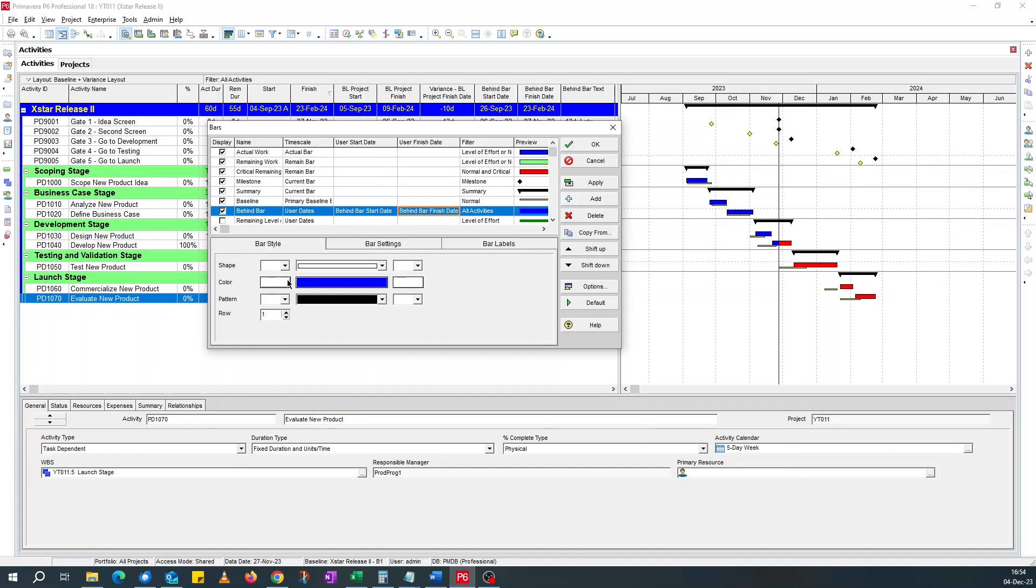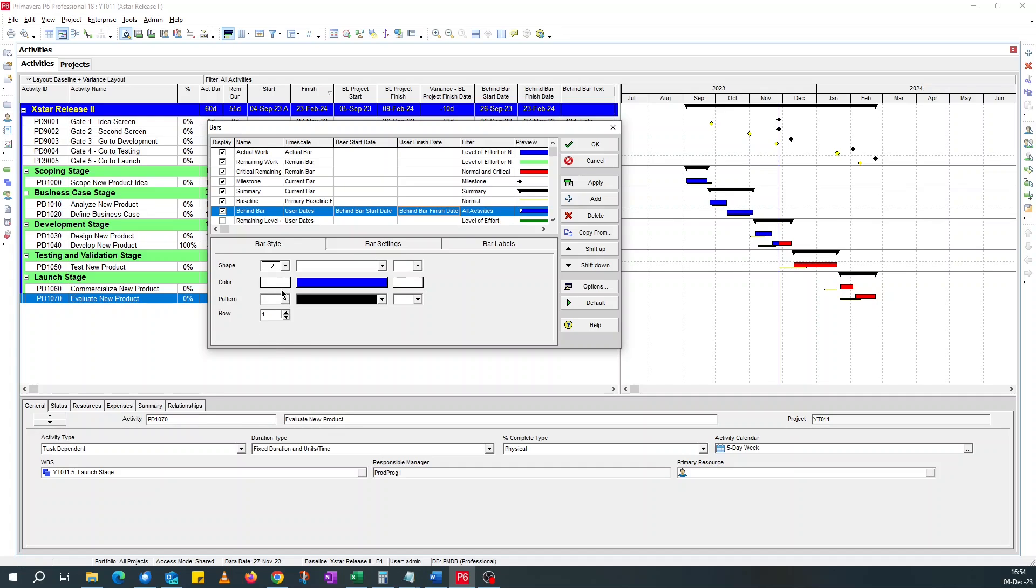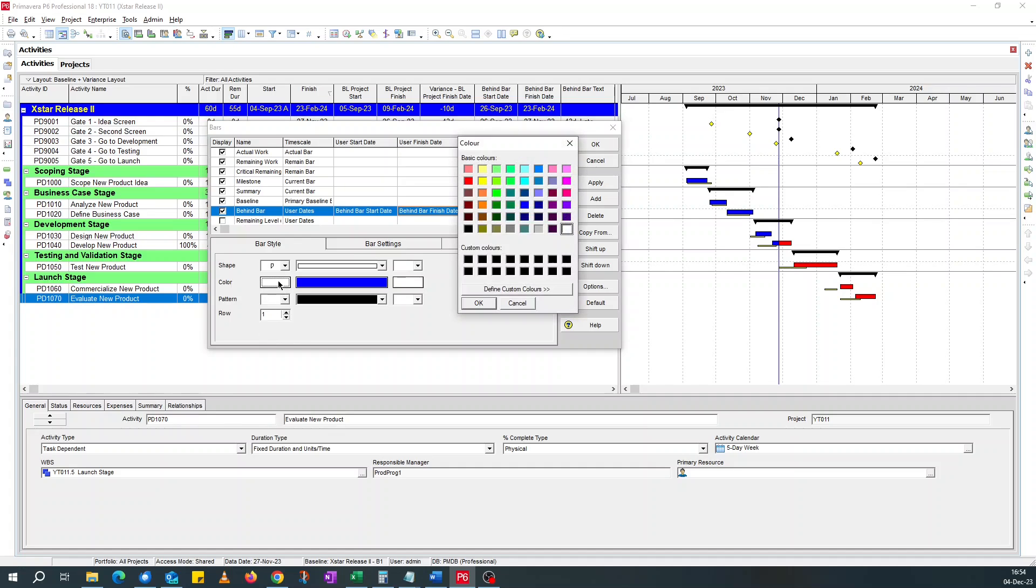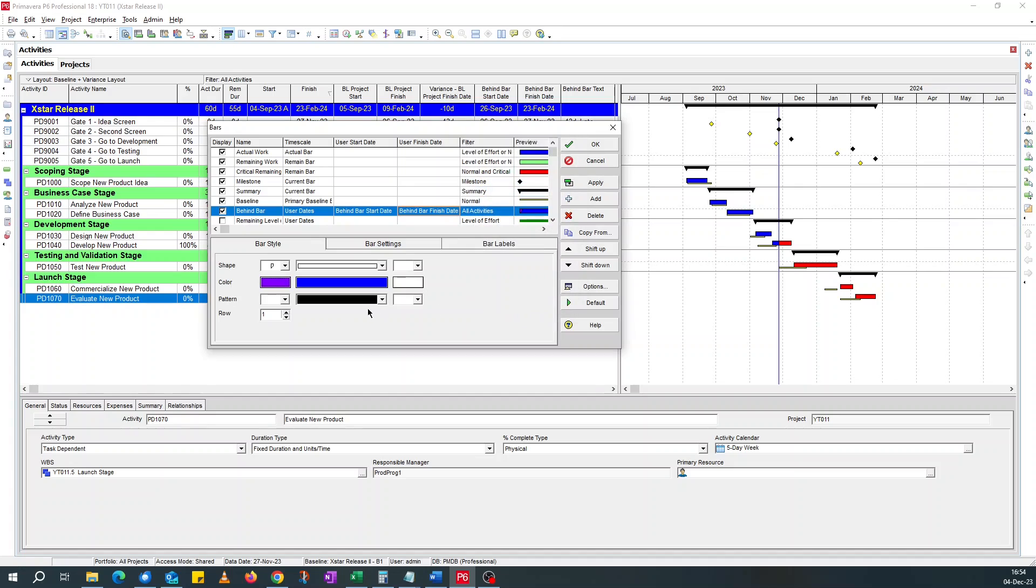Now for the bar style, let's see the shape I want. I'll go for this shape. Color, go for different color. I'll go for purple. Pattern, I want it filled. I want it on the same row as the baseline because the variance is against the baseline. So two.